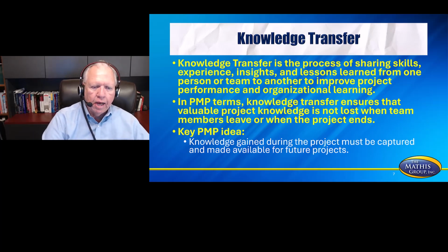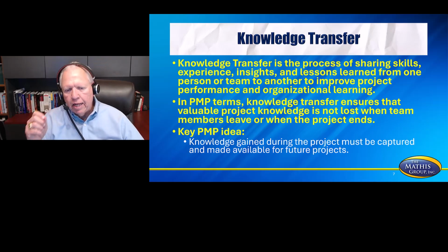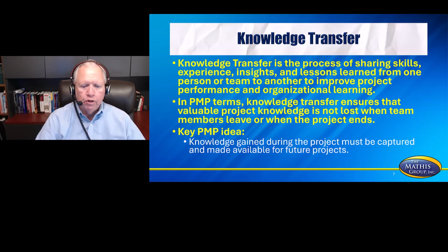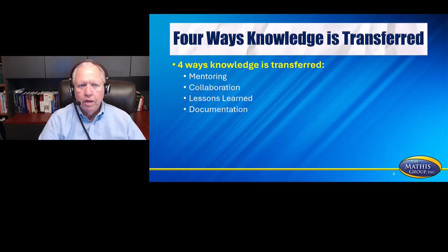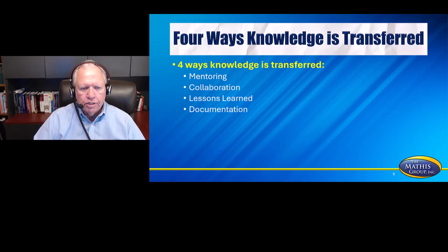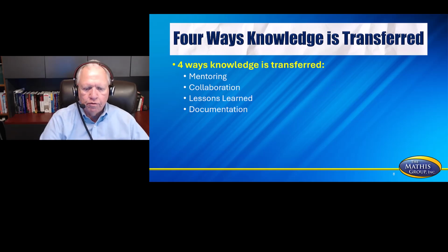The key PMP idea is that knowledge gained during the project must be captured and made available for future projects. There are 4 ways knowledge is transferred, and this is a strong emphasis as well: mentoring, collaboration, lessons learned, and documentation.